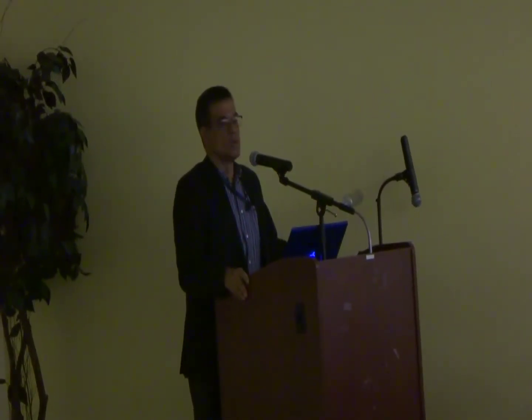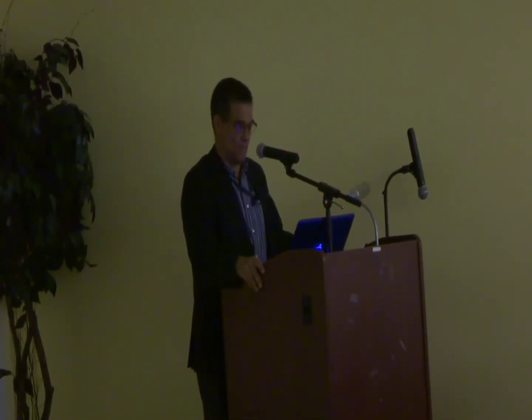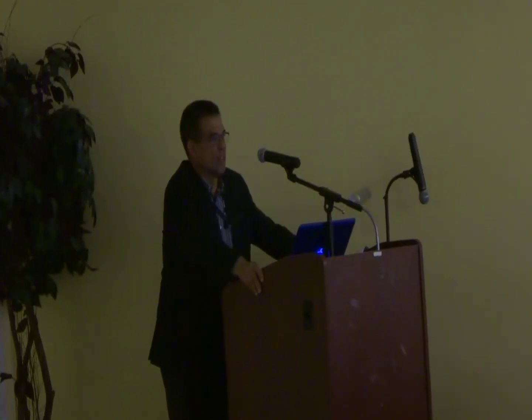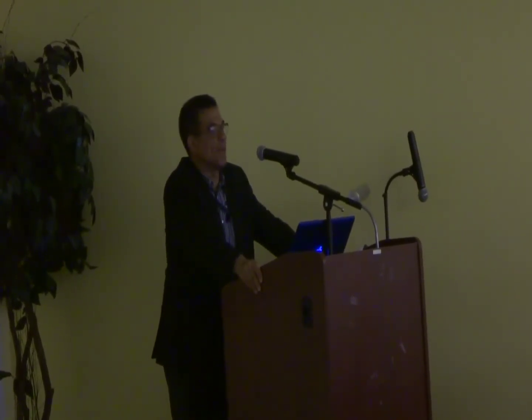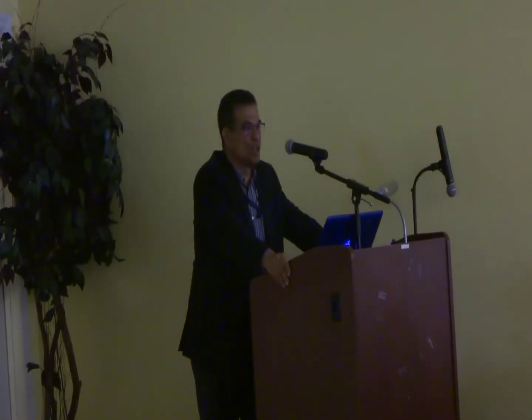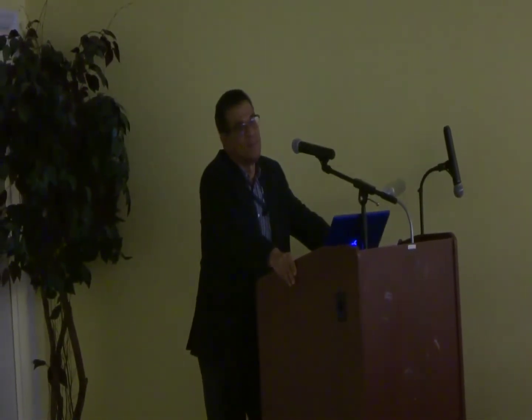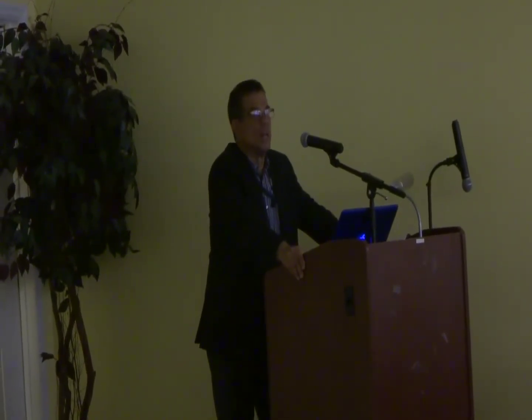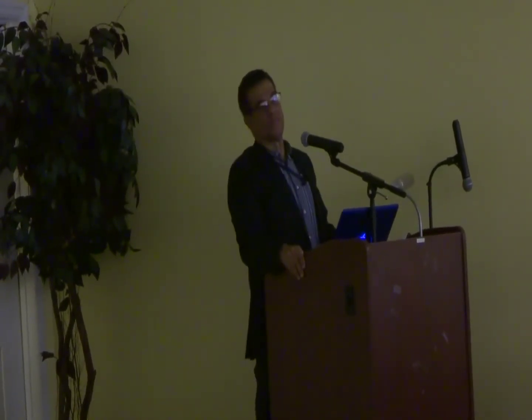Where you tender to the particular selected tenderers. Yeah? Sometimes what happens is you can go to a two-stage tendering strategy where you can select the contractor to do the job, not based on cost. Right? You can select the best contractor and then end up negotiating with him.